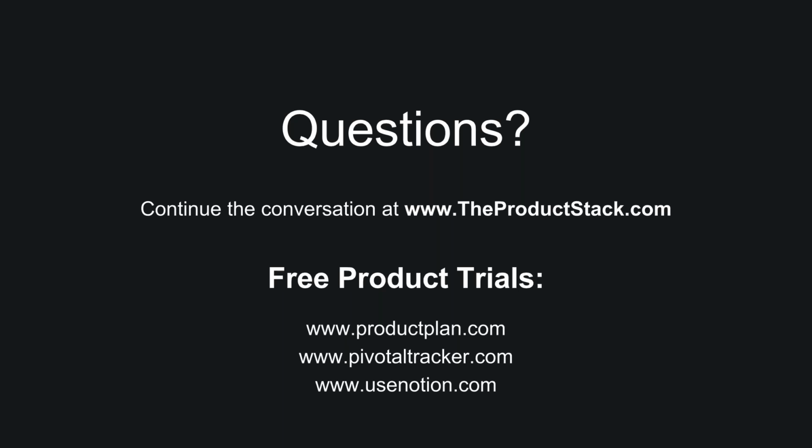And then once you get into the tactical mode where you're breaking down a feature into small stories, that's when you're estimating in actual points as a team to uncover different assumptions, to get everybody on the same page, and to try and keep your granularity super high. So small stories, that's where estimation comes in later.